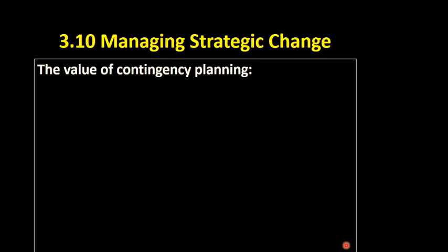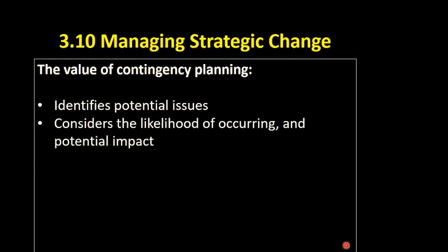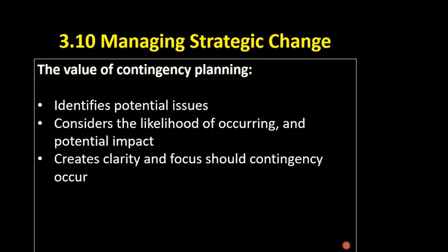Okay, so what's the value of contingency planning? Well, it's going to make you identify the potential issues that are threatening your company, and then you consider the likelihood of them occurring and the potential impact, which allows you to take a logical approach to contingency planning. It's far more effective to plan for a contingency that's likely to happen and could cause a big negative impact than one that's highly unlikely to happen. So contingency planning helps you set your time and prioritise correctly in terms of what you should be focusing on.